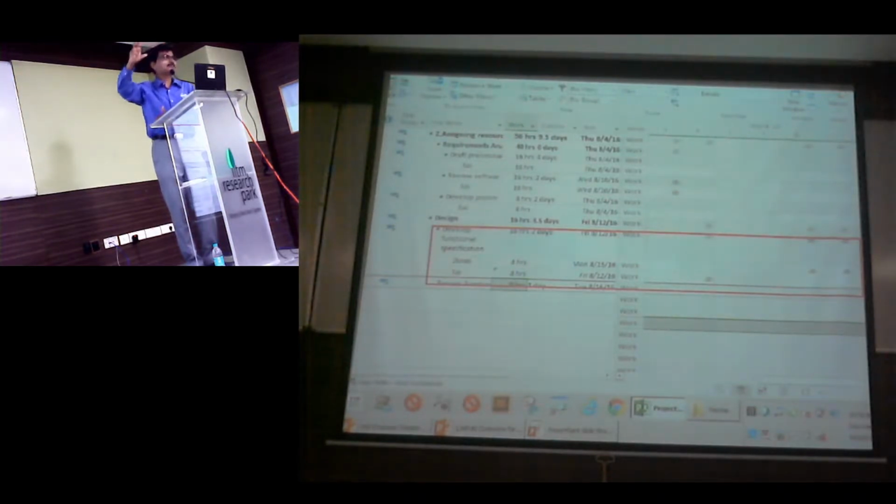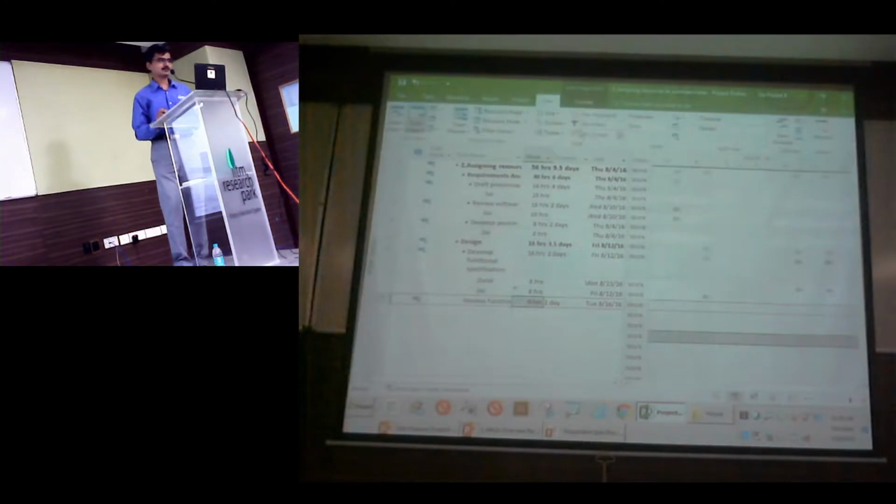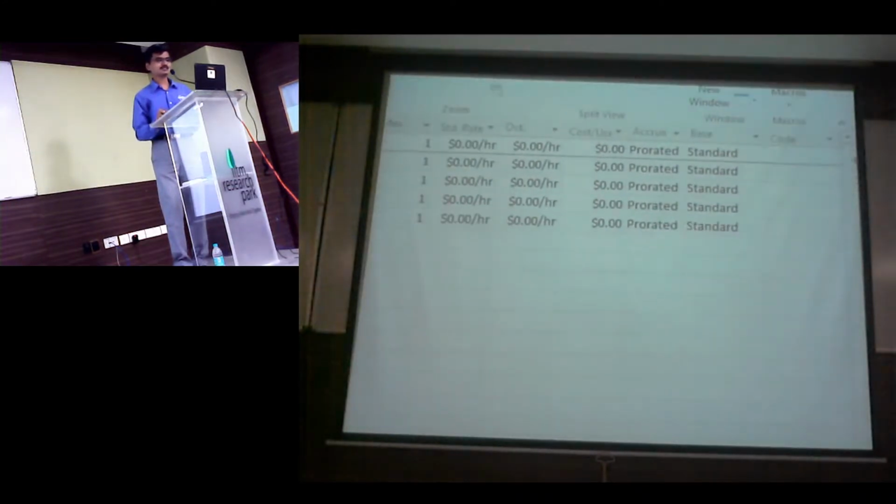The same team member, more resources can be assigned. So that means for different locations I can have different base calendars and then associate those base calendars with the specific resource. Exactly. If you have seen the resource sheet, you would have seen this column. This is where you will say my first 3 team members are from Chennai, the last 2 team members are from Coimbatore. So the benefit you have is, tomorrow if the working time in Coimbatore changes, you change it at the base calendar level and it automatically gets updated.